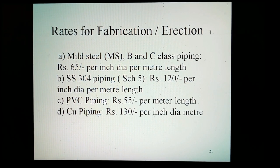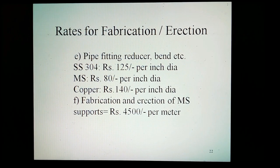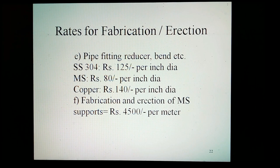Typical rates for fabrication, erection, and testing of pipelines for costing purposes. For example: MS piping — elbows at ₹45 per inch, erection at ₹[geo] per meter length; SS300 schedule piping — elbows at ₹90 per inch; PVC piping — ₹45 per meter length; copper piping — ₹100 per inch. Pipe fitting reducers: SS304 at ₹125 per inch, MS at ₹60 per inch, copper at ₹140 per inch. Fabrication and erection of MS supports equals approximately ₹4500 per MT.